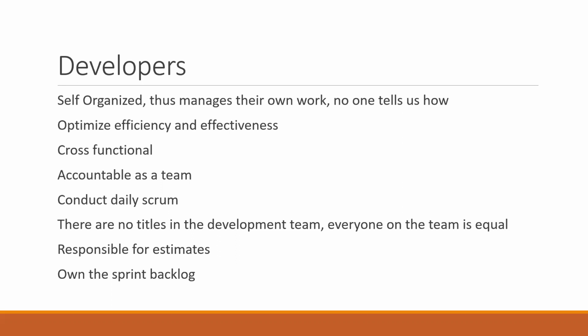If you're using Jira, there's the comment section. Every time you come to your daily stand-up, if they're actively working on a story, that comment section needs to be updated. So if today is the 19th and you see a story that they have actively been working on and it was updated 3 days ago, it means there's a problem with that story. They are either stopping work on that story and have picked something else, which now you have to bring in your work in progress limits.